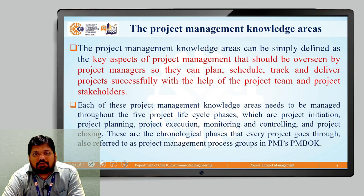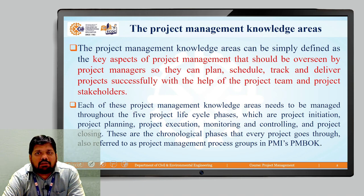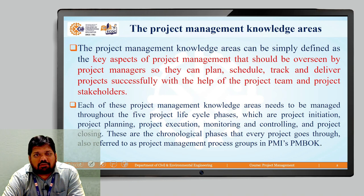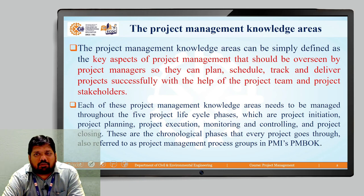Each of those project management knowledge areas needs to be managed throughout the project life cycle phases: project initiation, project planning, project execution, monitoring and controlling, and project closing. These are the chronological phases that every project goes through, also referred to as project management process groups in PMI's Project Management Book of Knowledge.